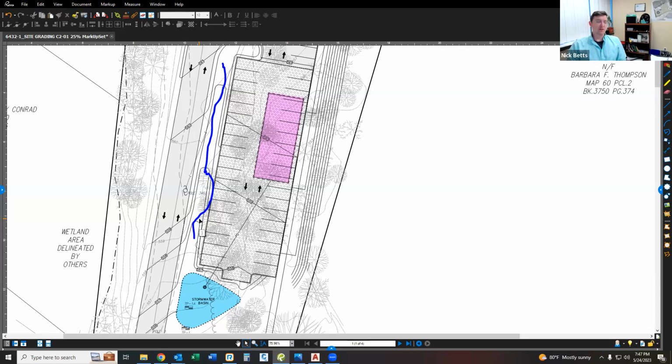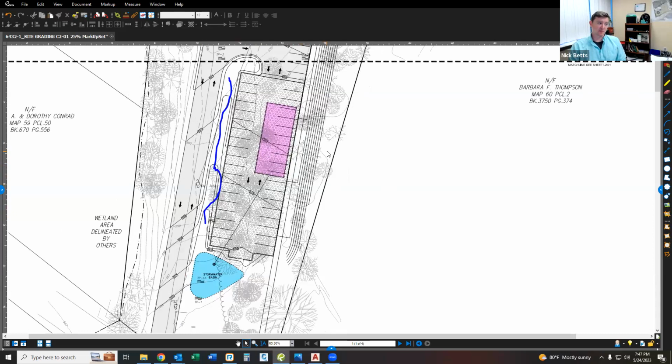I mean, they certainly do it. I think it would become just your appetite for the expense, because my guess is that it's going to be ledge pretty much from Mass Ave into wherever you're going. They definitely can lay pipe, but they would have to go in and basically blast out the trench to put the pipe in.